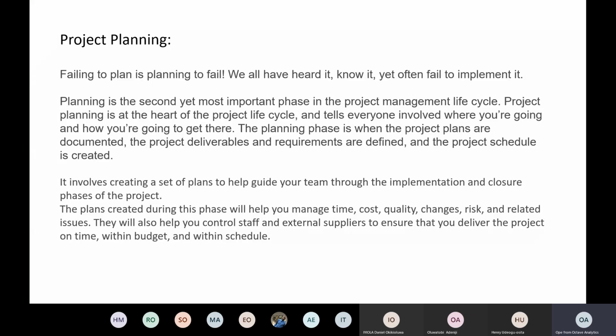Okay, so that way, once you have defined your deliverables, you can put them in the backlog. The backlog on the sprint dashboard is a place where you have the list of all your goals and objectives, and then they are just sitting there waiting to be assigned. So from your backlog, you can pick up tasks to assign to team players, and you can also return tasks to your backlog and pick them up to reassign to someone else. So it's a mixture of many things, you understand?